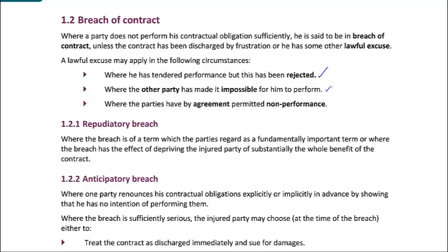And in that scenario, the builder decided to go away. He decided that by agreement he would not complete the contract and he would forego his element of consideration, the extra payment, and my friend would forego having the builder complete the work to the required standard. Therefore, you almost have a contract that agrees to discharge the contract early.